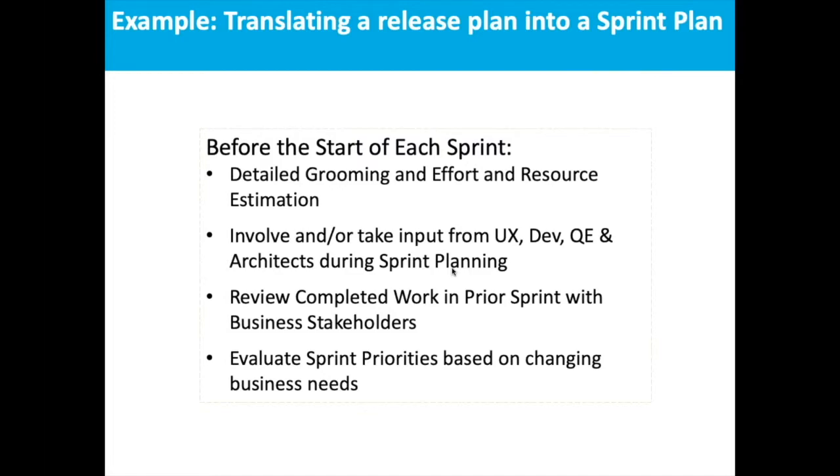It's probably not possible for you to actually do a sprint review with customers because that's just too onerous, and you would not be able to find customers to give you feedback every 2 weeks, but there are proxies for customers like your CX team or the customer experience team or your sales team in some cases, who you can bring on to your sprint planning, your sprint review sessions, and show them what you have worked on, and get their feedback.